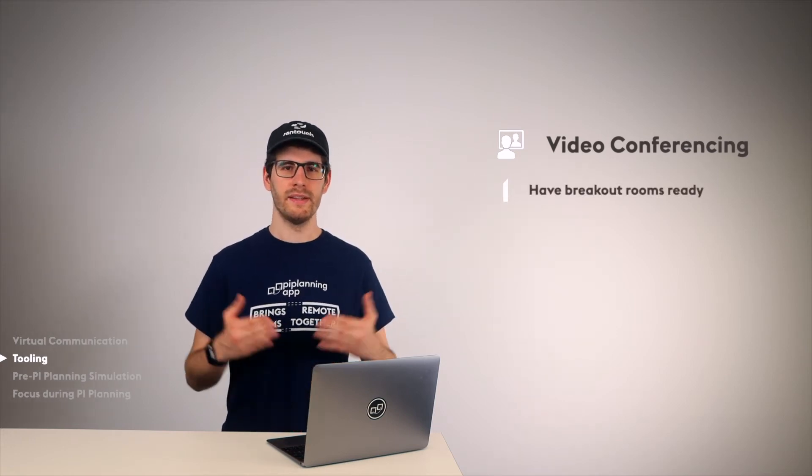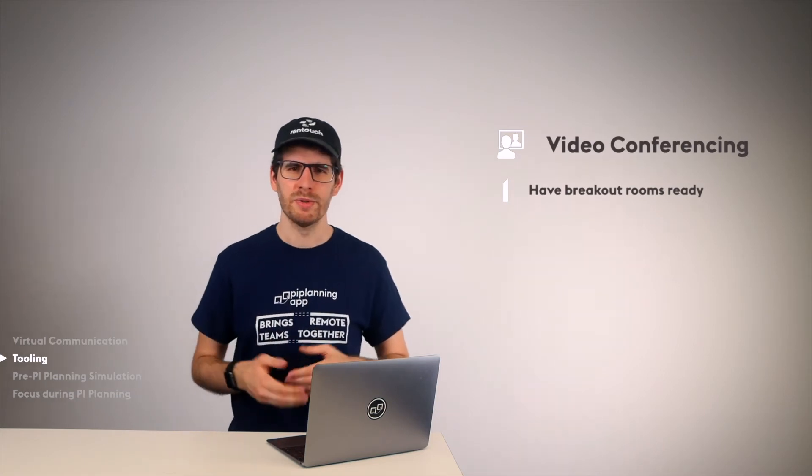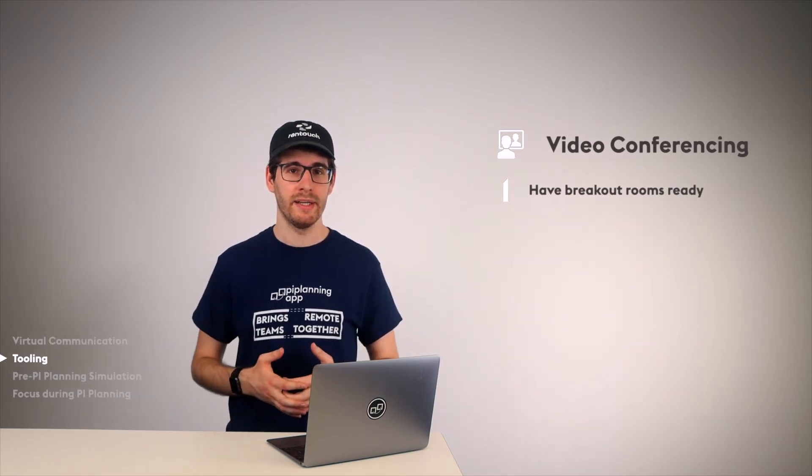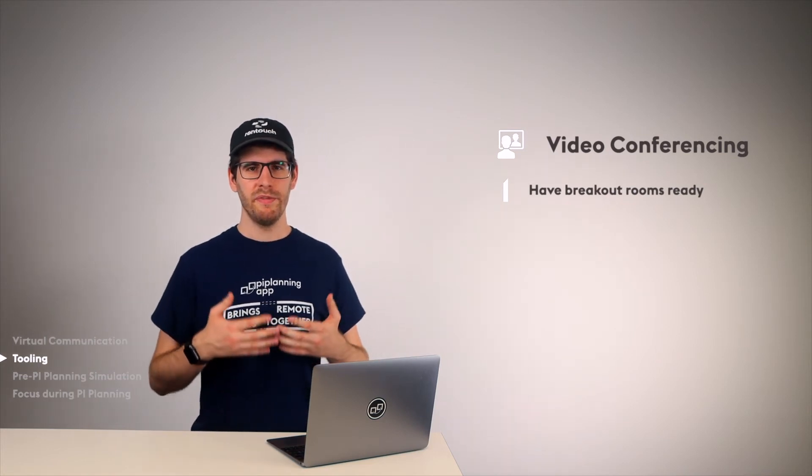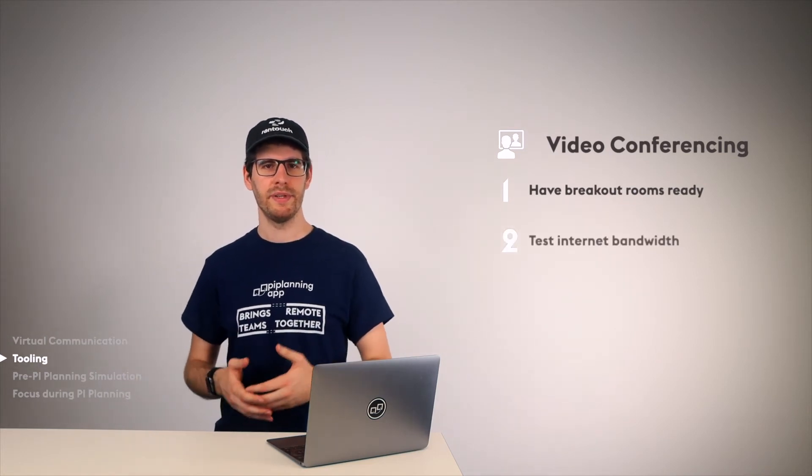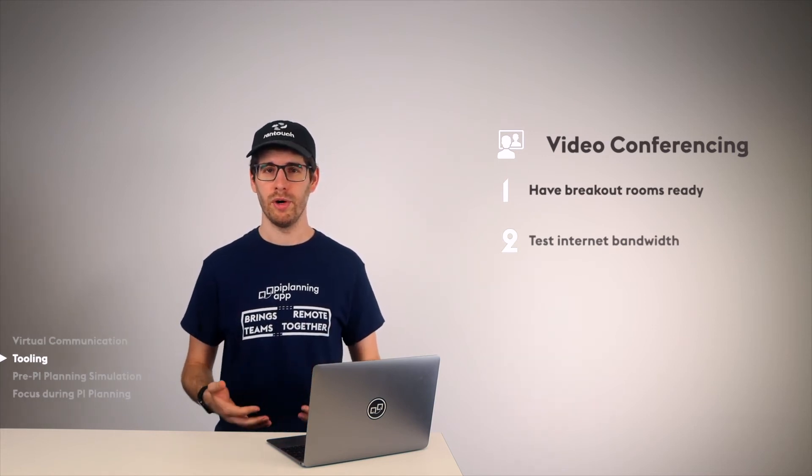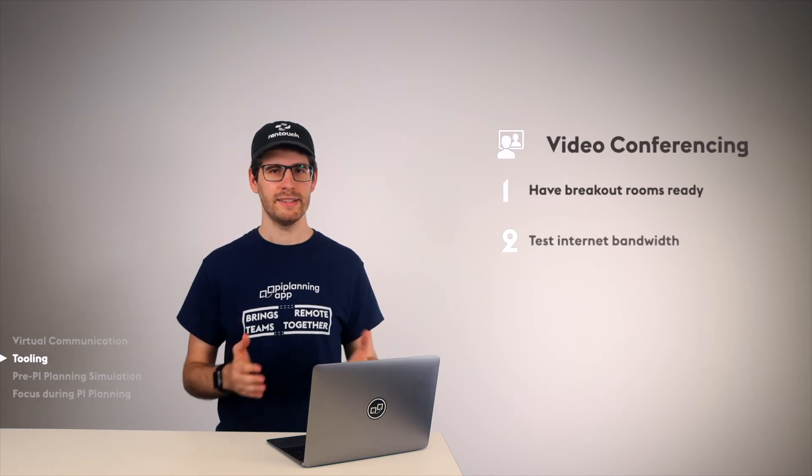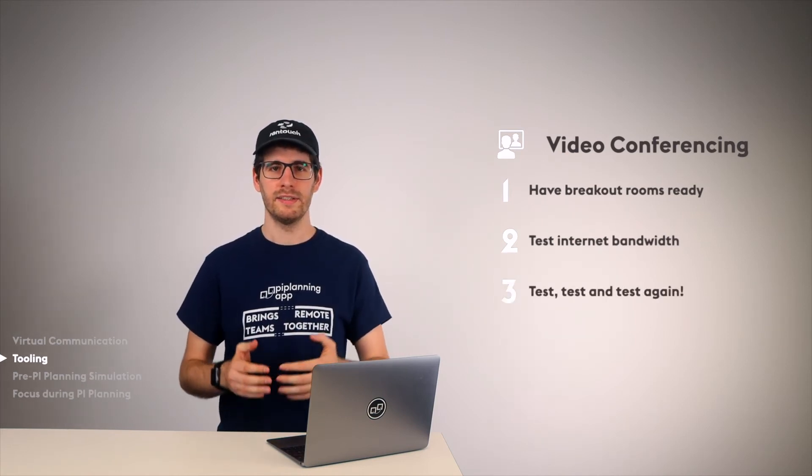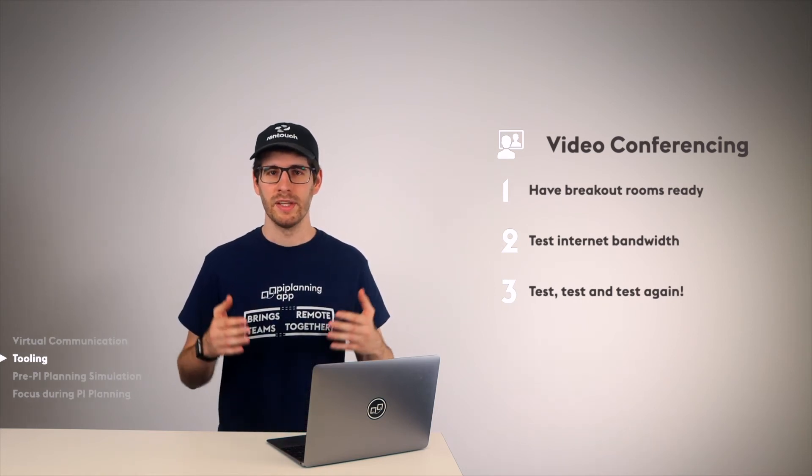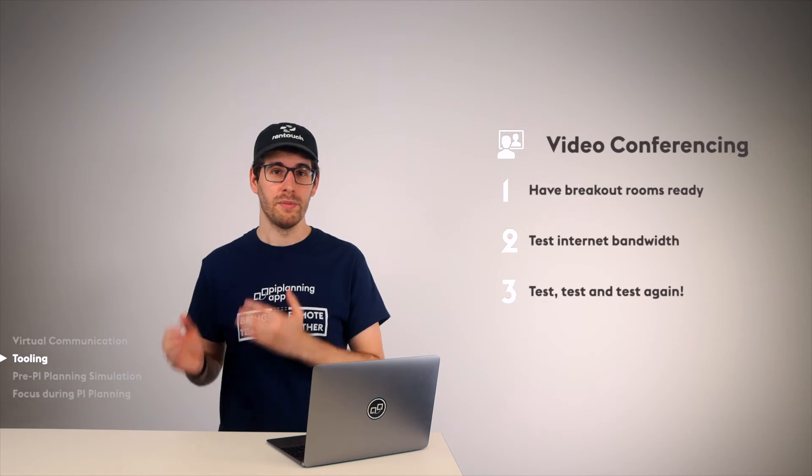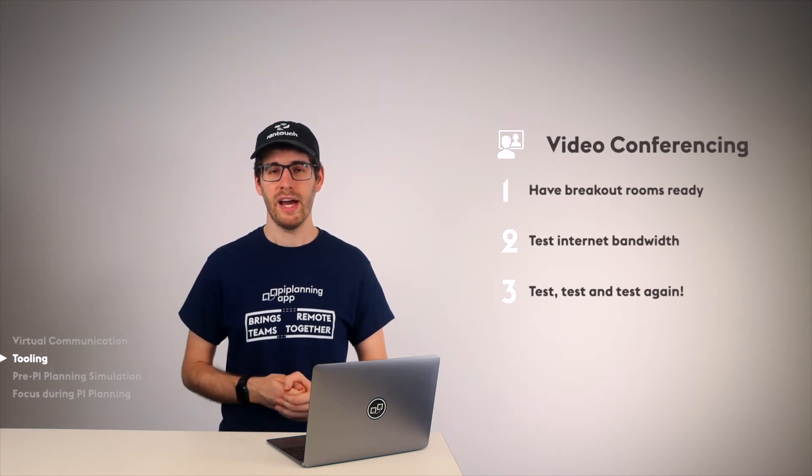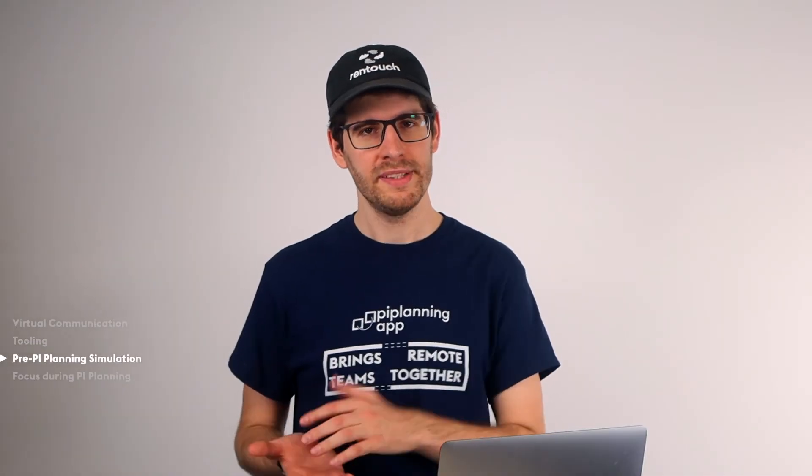Regarding your video conferencing tool, make sure you have breakout rooms ready. Don't think at the day of PI Planning, hmm, breakout rooms would be nice. Prepare it before PI Planning and also inform the teams on how to use it. Before you go into PI Planning, test the internet bandwidth with all the participants working from the home office. I can't say it enough, test, test and test again. You really can't test enough. It's technology. Things can go sideways. Try to think when preparing of the worst-case scenarios and make sure you have a plan B.